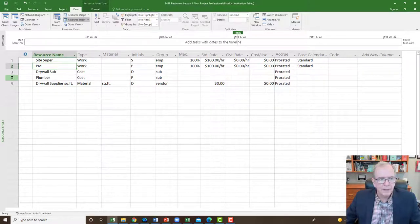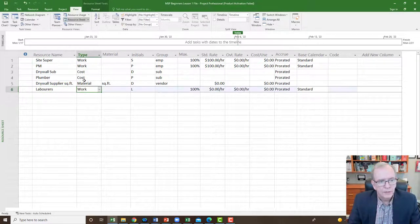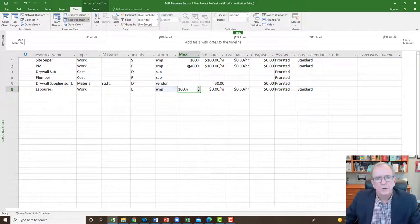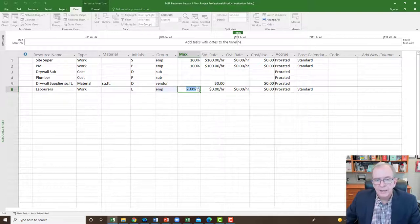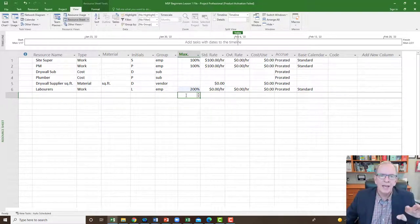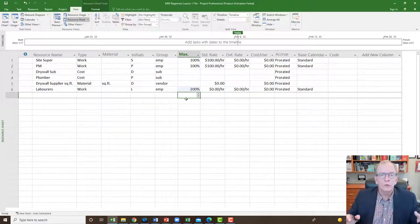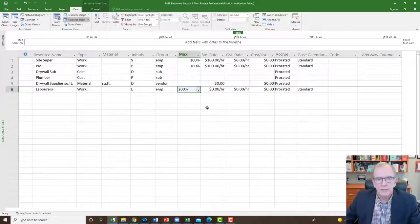I'm going to add another resource at the bottom — laborers — set as work and employee. Notice the maximum column says 100%. For site super and PM that makes sense since they're one person, but for laborers I might have 10. If I have 10 laborers I should put 1000%; if I have two, I put 200%. That identifies how many are available. If you only have two laborers and you assign more than two, the program will flag it and ask whether you're going to hire somebody else. That's why the 200% matters.